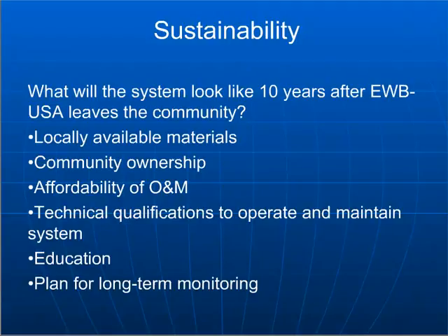So you don't want to pack your suitcase full of specialized plumbing fixtures and bring down just enough for your project, and then the first time one of them fails, nobody knows what to do with it, and suddenly the system isn't used anymore.